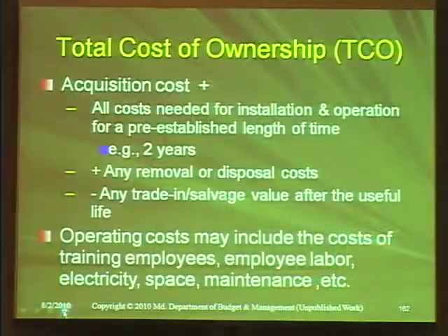If it's a sealed bid procurement, the price is the element of the award. It's the only thing you consider as long as the vendor is responsive and responsible. If you have a sealed proposal, price is one of the 2 elements you will consider along with technical capability. But in any case, you're going to have a price that you're going to look at.